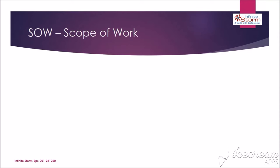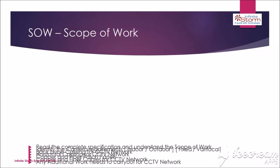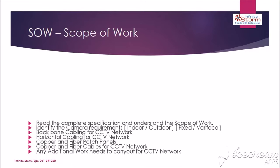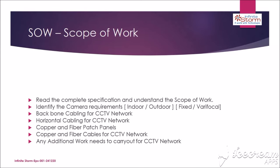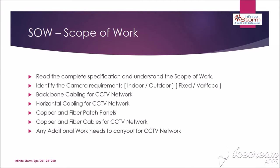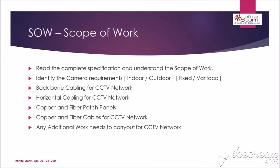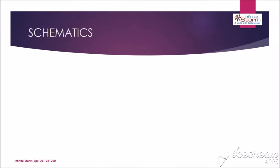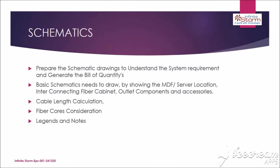Understanding the scope of work is the best start to providing an accurate design. This includes identifying the camera specifications and requirements, cabling and accessories such as interconnection fiber and horizontal ethernet cables, as well as patch panels and other requirements. Prepare schematic drawings to understand the system requirements and generate the bill of quantities.